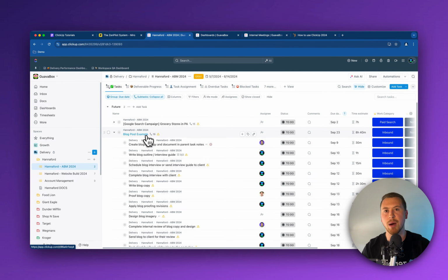And when we break that up, it's going to make it way easier for me as a project manager to know exactly what step we're on, to know exactly what we finished, where that time actually went, and start to know what pieces of this project are overdue or ahead of schedule. Because when you only have maybe one task in the system for this blog post and it's assigned to a bunch of different people, or maybe not, I'm not able to know what step we're at and how well we're pacing towards that timeline. So it's so important to have a task structure like this, to make it easy for me to know who's accountable for what piece in this workflow, as well as how far along we are on this specific project.